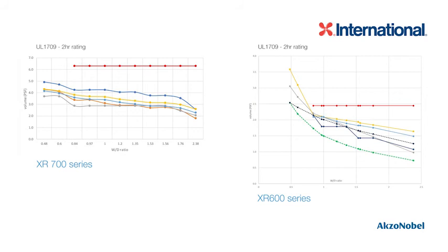These not only show the multi-sectional thicknesses, but it's been calculated to show the amount of volume in pounds per square foot. So how many pounds of cementitious material? We typically will bid these in a bag price, a 50-pound or 40-pound bag. But these are the volume of pounds per square foot based on the steel size for a 2-hour hourly rating of UL 1709. And this is the same situation we have with the epoxy intumescent materials. You've got volume based on pounds per square foot, based on steel size. You can see the big difference in the volume, and that's really the driver.